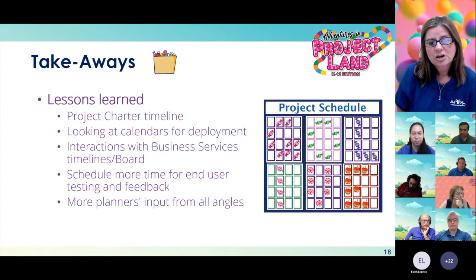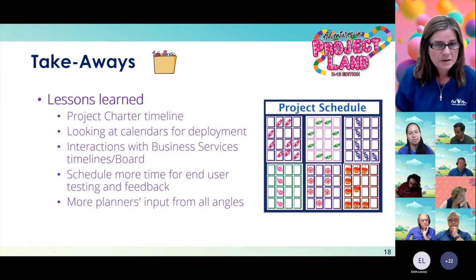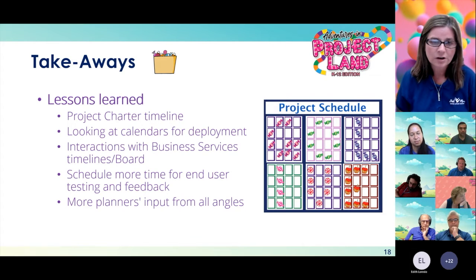Take a look at your project charter timeline. As Elena said, pad some time in there. We would think that a vendor who does this for their business, that was recommended by a major vendor of ours, a partner with us, would be able to handle our rollout and not be done with the network 3 to 4 days late and have us go through hoops. Look at your calendars for deployment. Look to see, are the report cards coming out? Is it the end of the school year? Things like that. Your interactions with your business services and your board.